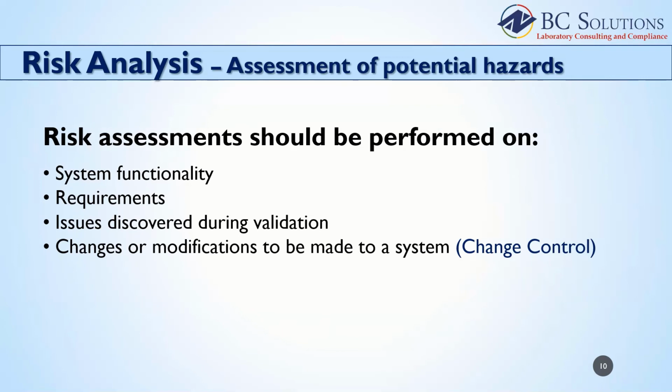During the software lifecycle, we want to make sure that the software we are using in production maintains a validated state at all times. You will likely need to perform table changes, bug fixes, patches, and version upgrades throughout the lifecycle of your software. But how do we determine how much validation is needed each time? If you are making a simple table change, you may be able to focus your validation on just a few functions.